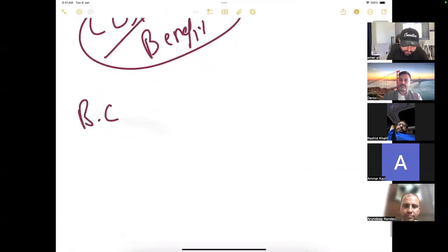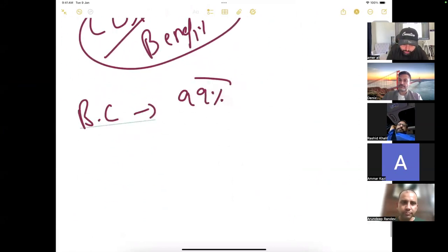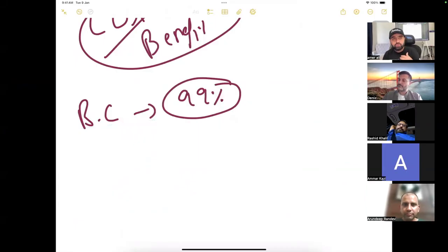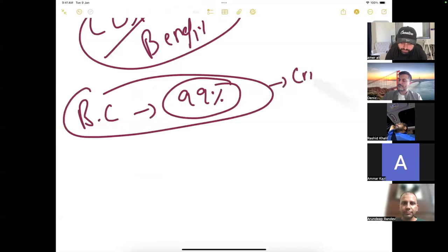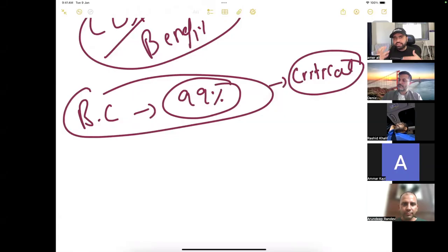You see, 99% of the time we do a project to increase our revenue. We do a project to increase some tangible benefit, right? 99% of the time. So the business case is the most critical document in your project. But I call them pre-project activity. They happen normally before the project, not in the project.